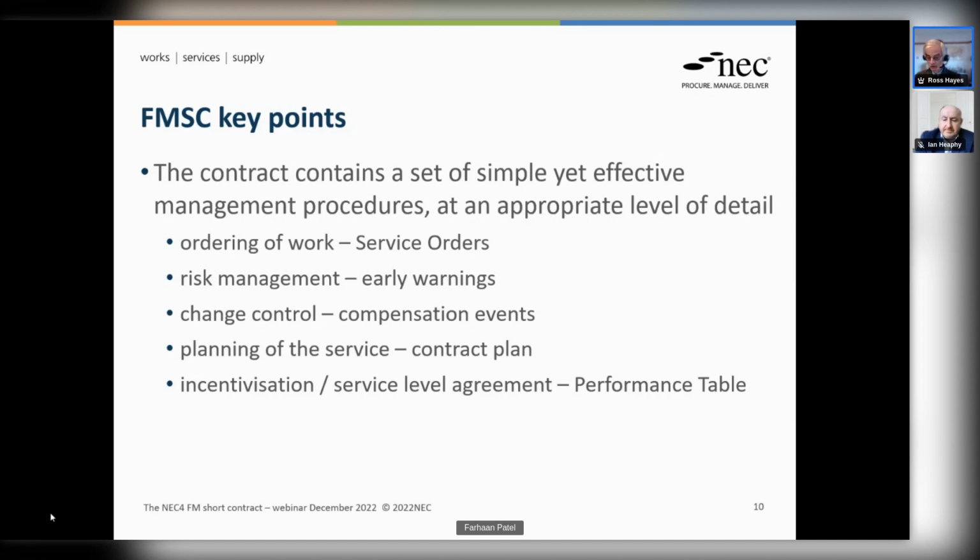If I'm going to use this contract for concierge services, cleaning services, and maintaining all the gas heating systems in a series of houses, then I've obviously got to determine and detail all that work very carefully in the scope, because there's no particular procedure that relates to concierge services or cleaning services or gas maintenance in the contract conditions themselves. So I have to just remember that because you can use it for everything, whatever you want doing has got to be very carefully detailed in the contract.